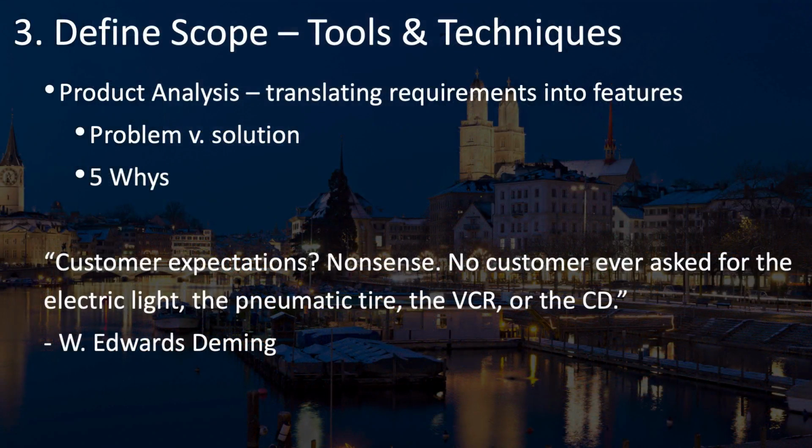Another product analysis technique that you can use is to evaluate each requirement and ask yourself whether that requirement expresses a problem or a solution. Most of the time, it's expressing a solution. And by using techniques such as 5 whys, you can get at what the real problem is. And by understanding the problem better, such as the need to have properly spelled documents, you'll be able to look beyond the simple request for a feature such as a spell checker and come up with even better solutions to